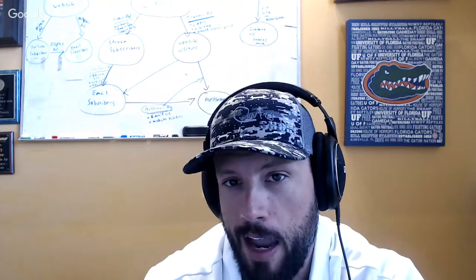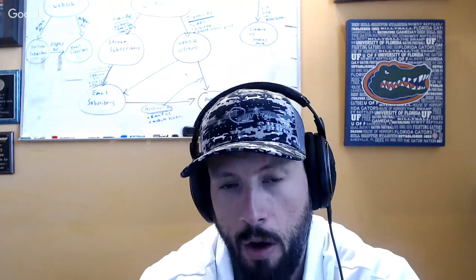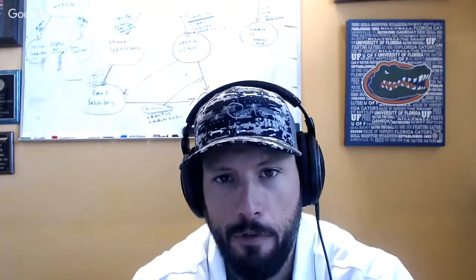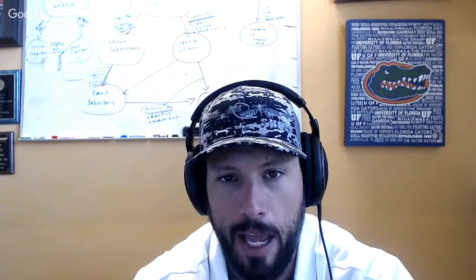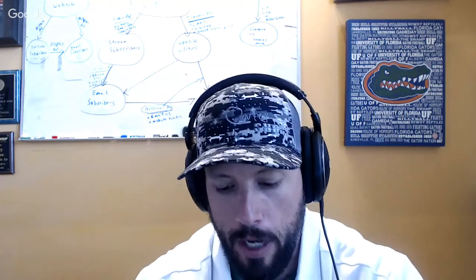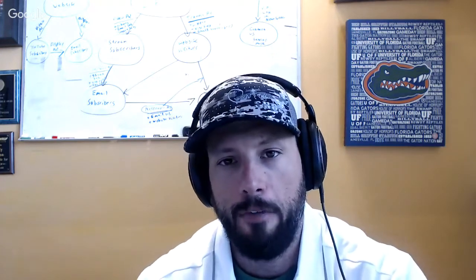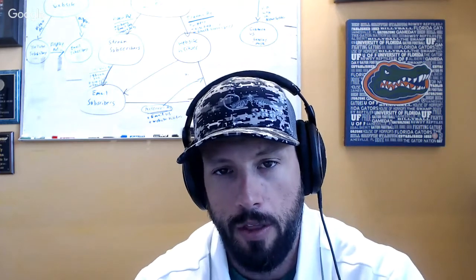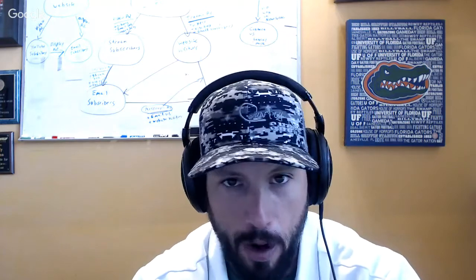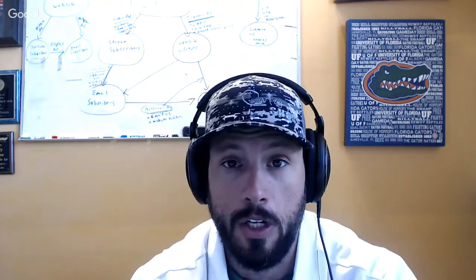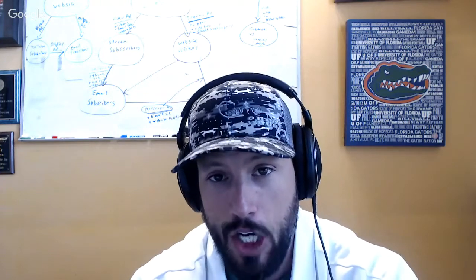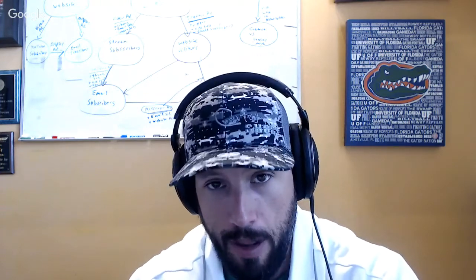At the same time, we have to collect feedback from what's actually in production from our live end users. That helps us set the agenda for our IPM, or the iteration planning meeting, which happens at the end of every sprint. We'll say, okay, here's the feedback we have from internal testers and users on the new features on staging, and here's the feedback, qualitative and quantitative, from our end users on production. We use that feedback every week to set the agenda for the upcoming sprint.